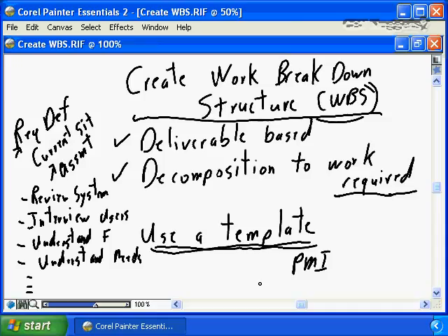With the work breakdown structure completed, you will present that to senior management, you will present that to your project sponsor, and you will say, based on this work breakdown structure, if I complete all of the work defined in this breakdown structure, will this A, satisfy the statement of requirements, the scope statement that has been produced, and more importantly, is this your expectation of the work that I need to undertake as part of the project to achieve the business objectives for which this project was initiated? In other words, if my project successfully delivers the work defined in this work breakdown structure, will it address your business requirements?